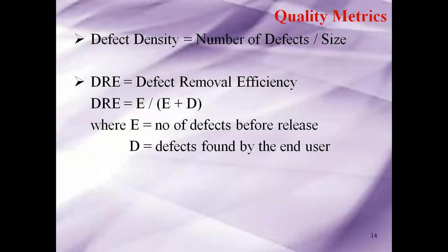The number of documentation defects divided by the total number of defects for that entire project. That is one defect density. Further down, to bring it to a granular level for the documentation: author-induced defects divided by the total number of documentation defects. And the total number of technically induced defects divided by the total number of defects in the documentation.